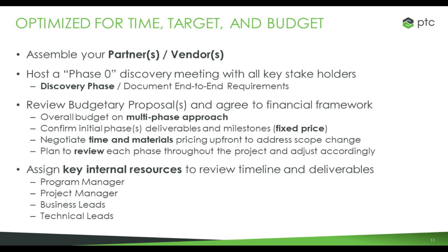Review your budgetary proposals. This is important for a whole bunch of reasons, right? Again, I talked about a boutique shop that might want to own as much of the slice of the pie as they can, and then they're going to try to control that throughout the project life cycle as well. So what I always say is look holistically at the overall project itself from beginning to end. Put together a large budget for that, and then chunk that down into phases, and then budget and manage to those phases.